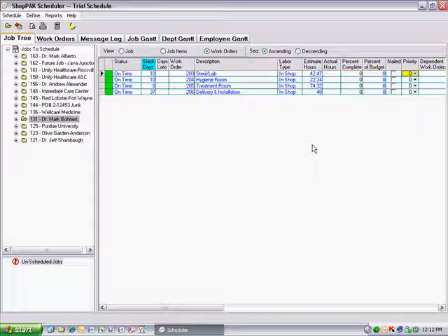There is an important relationship between work order dependency and sequencing. If a work order is dependent upon a primary work order, it must be sequenced after the primary work order. Usually this means that once you set up one or more work order dependencies, you'll have to manually sequence work orders, explained in Chapter 7, Work Orders tab. In fact, the scheduler automatically turns on manual work order sequencing when you create a work order dependency, if it isn't already your sequencing mode.